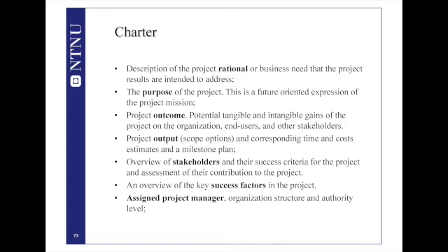So what are the main components of this charter? How should it look? Well, a charter, as I said, is a document. The first point on this charter should be the business need the project results are intended to address. You have a rationale, you have a cause, you have a reason. So actually, with the rationale, you describe the current situation. You say what the problem simply is.